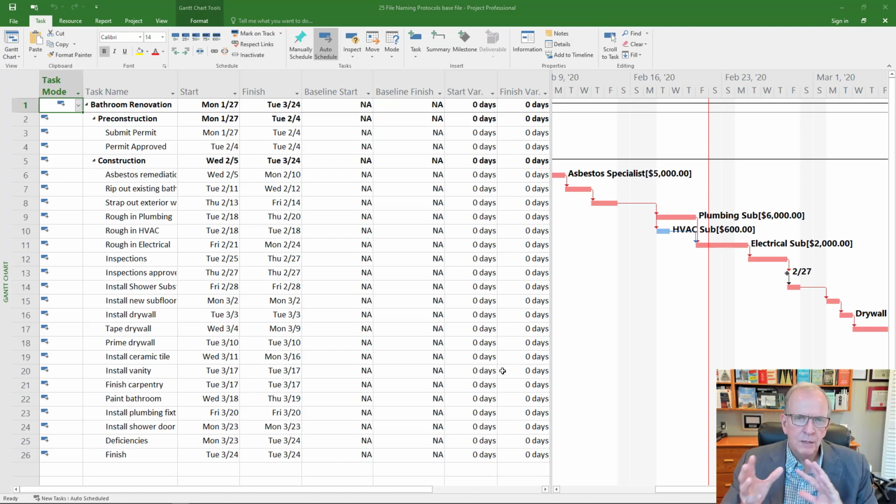But I wanted to talk about a different way of tracking and being able to easily find what happened during specific periods of time on your project. So I'm typically looking at projects that are months in duration, where you're going to do a multitude of different updates. You know, in construction projects, we very often have projects that last a year or more. And very frequently we do a formal update once a month. We may do it even more frequently than that.